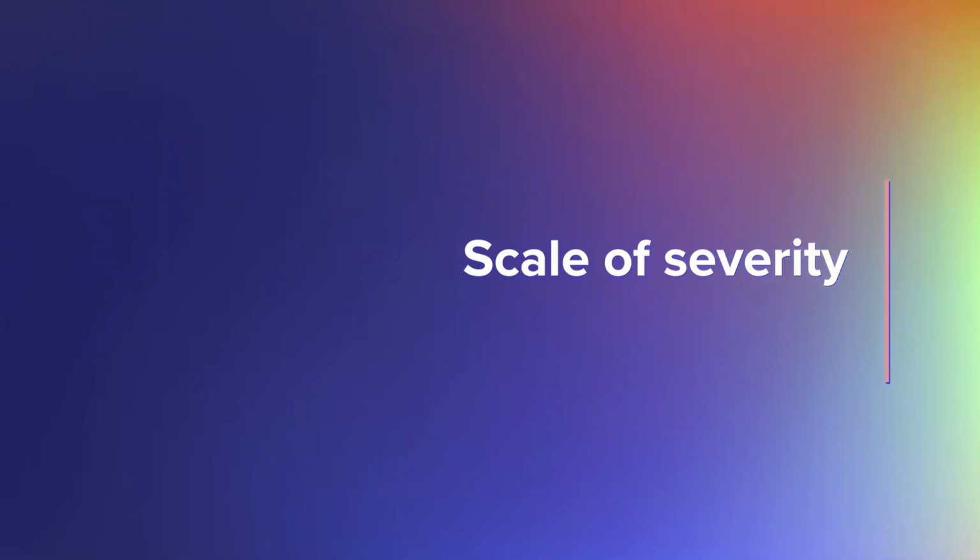Have you ever asked yourself, what's the worst that could happen? This simple question helps you gauge the severity of a risk you're about to take. We've broken risk severity down into three possible answers. Acceptable, where you'll hardly feel an impact if this risk occurs. Tolerable, where this risk will hurt, but there's no doubt your project will recover. And generally unacceptable. Think of this risk as a sucker punch that sends your project spinning.